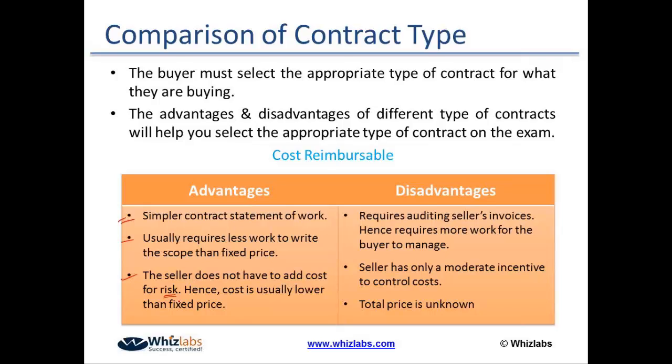So now if I ask you, what is the project manager's role in a cost reimbursable contract? Very simple. My first and foremost point is to manage cost. Ensure that the seller is not charging me unnecessarily for the cost. He or she is not billing me for something that is not justified. And we've got to audit every seller's invoice.